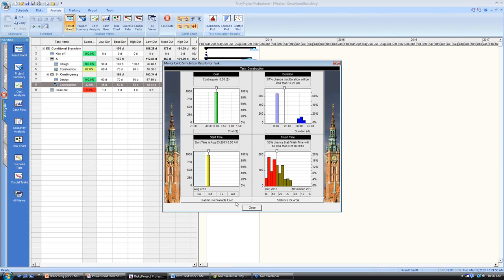If we are going down a development path and we want to ensure that we're going to meet a delivery date, you may have some penalties involved, but we have a preferred method, and we have contingency development going on underneath, we can model this and get an expected value of how long it's going to take us for the project, and how often we're going to go down the construction of our preferred model versus our contingency model. So very quickly we've been able to solve one of these problems.